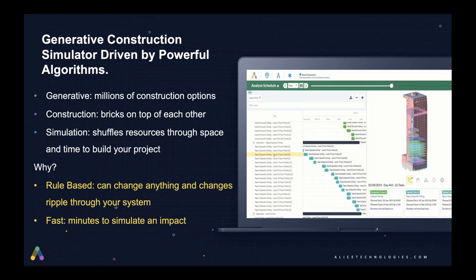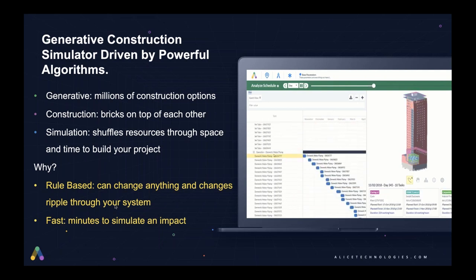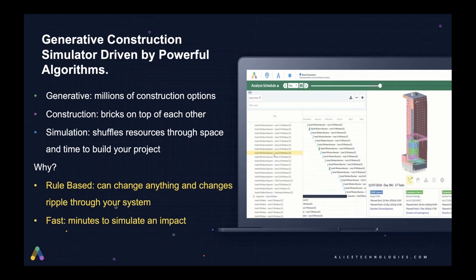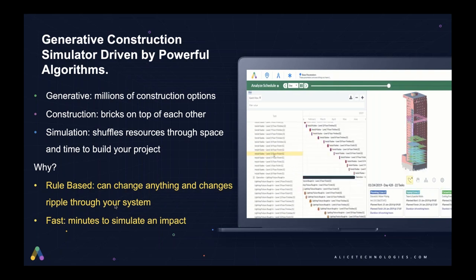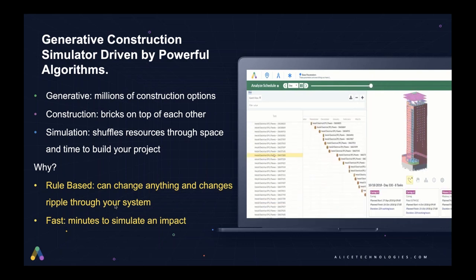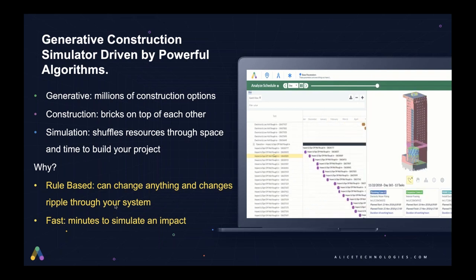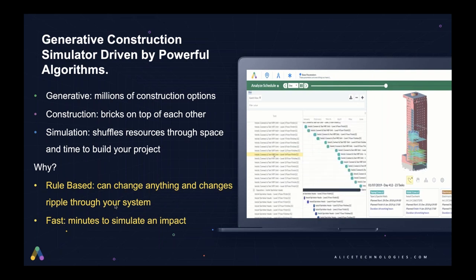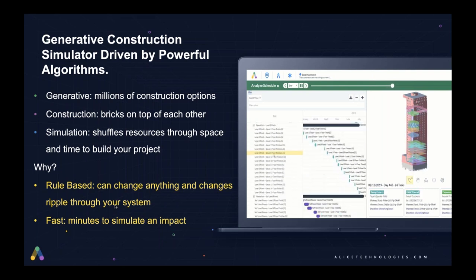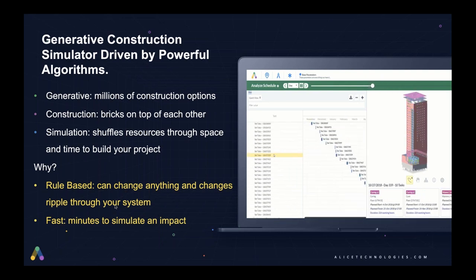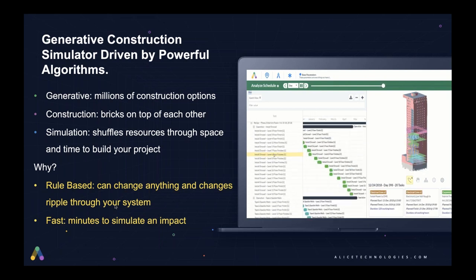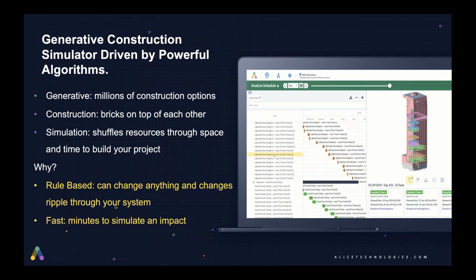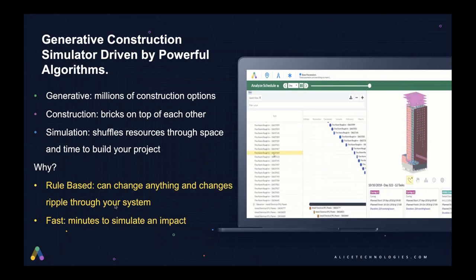So what is a generative construction simulation? You've heard me mention this a couple of times now. Generative means that you're exploring millions of construction options. You're not in what we call the lonely dot universe where you're stuck to one two-dimensional plan. Of course, you want to have a baseline that you can use and export to P6, but you also want to have resilience in your plan. Construction at a very simple level is bricks on top of each other, but at a more complex level, it's definitely hundreds and billions of dollars of material that need to be stacked and organized and assembled in the field. And the simulation shuffles these resources through space and time to build your project.